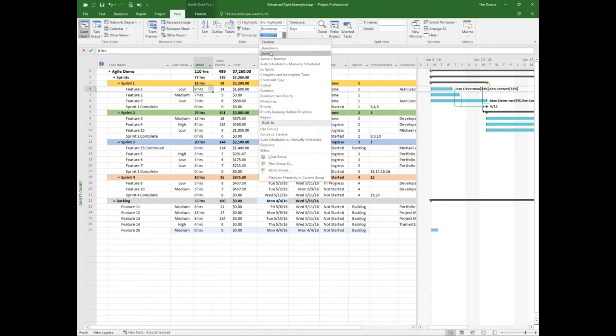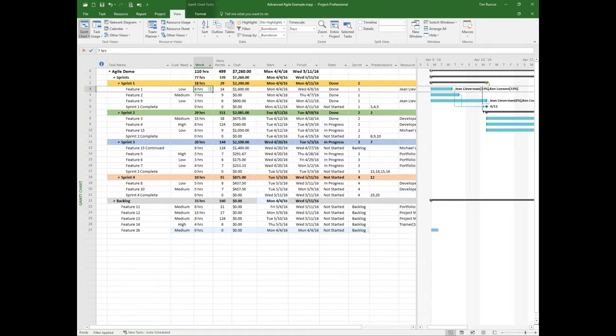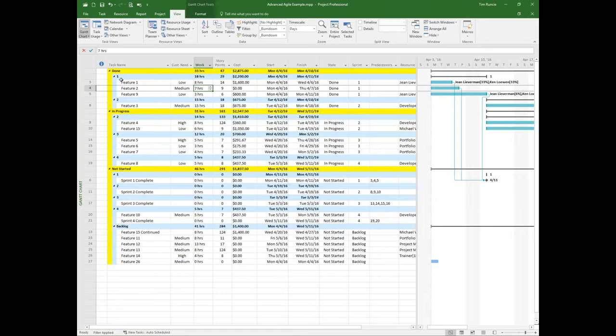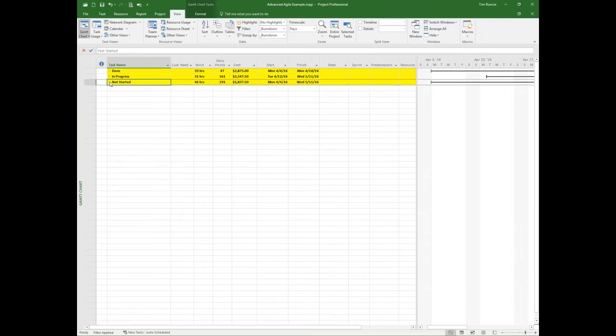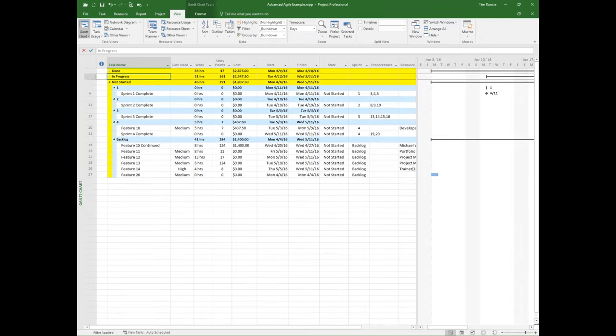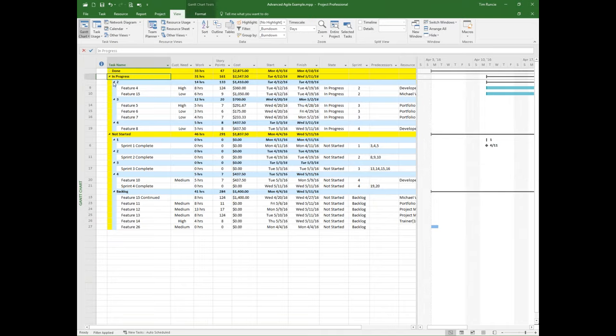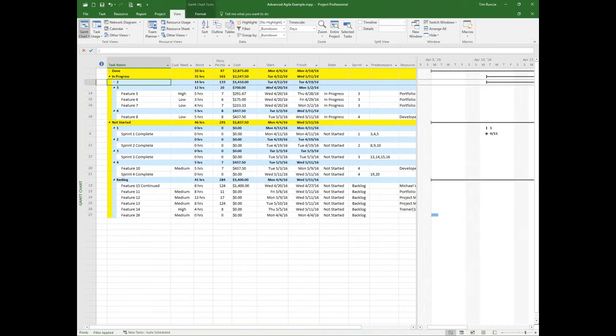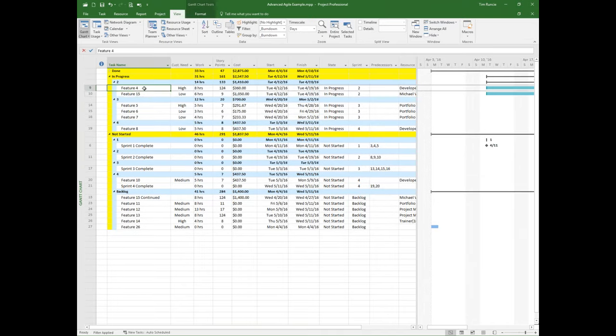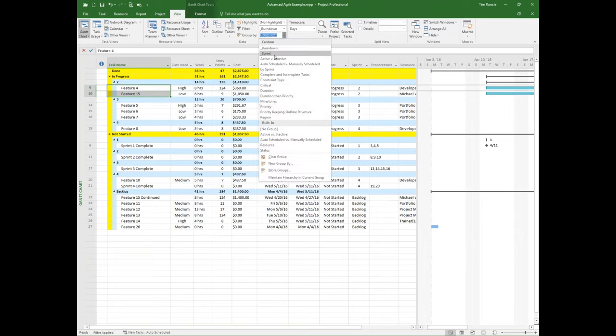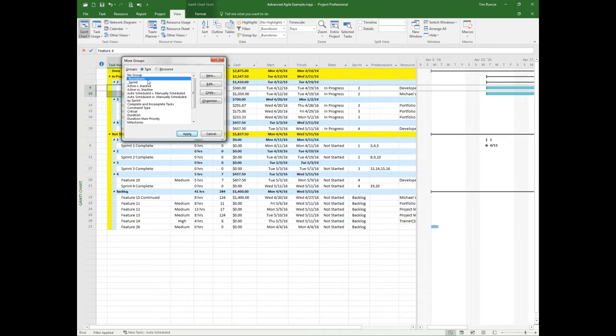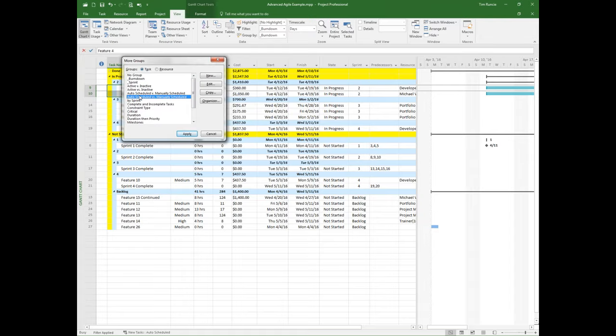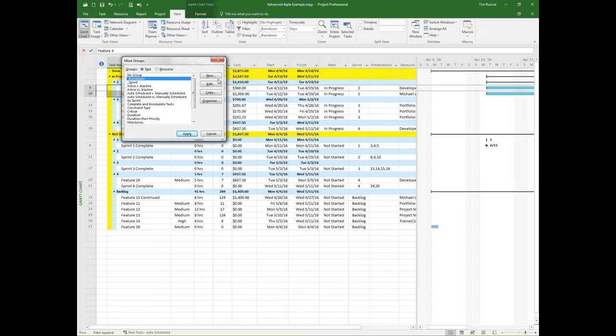And by making that a number field, we can actually do those calculations against it versus a text field. Now, finally, I went up here and I created a group here called burndown. And notice how it just basically groups the state column of what started, what's not started, what's in progress. And then it subgroups each of these based upon the sprint that they're in. So let's look at creating our own group. So I'm going to come in here and I'm going to click on more groups. And in this case, I'm going to click on burndown, which is the one that I built. But I normally would actually go and just create a new group. In fact, I recommend don't edit your original groups. It's not a good practice because there's other views, tables, and filters that might be used in project natively. So always make a copy of something to use it.